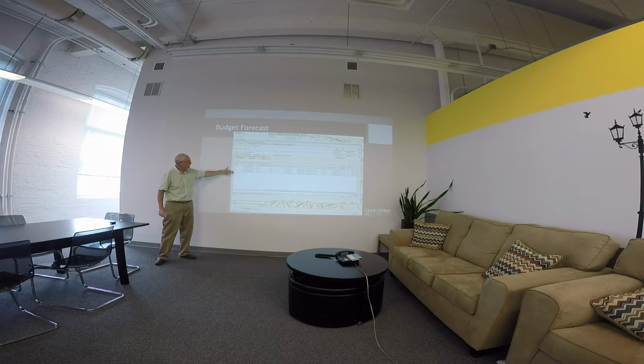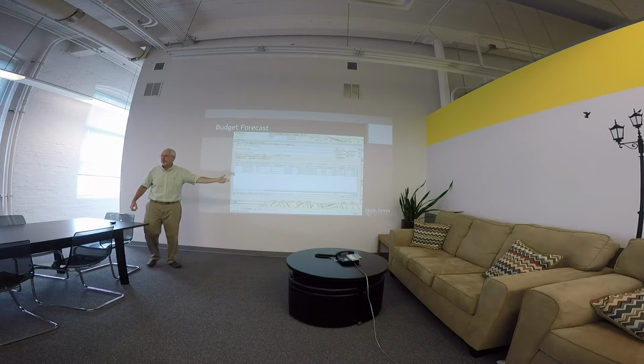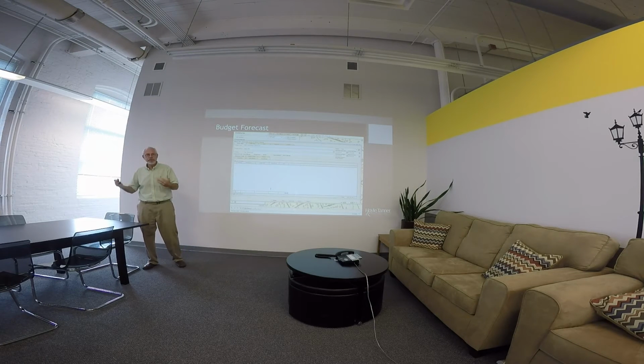For instance, I can bring in other costs, work orders, which would be actual costs associated with this project. I can start to track my actual work on this project, and those work orders could be added to this, against the project. I can add overhead costs to the project as well.